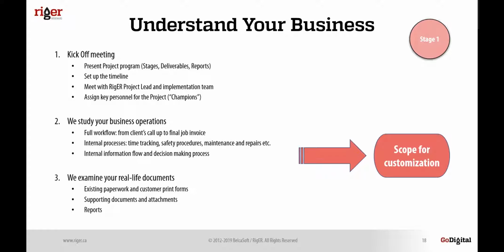On the first stage, understand your business, we usually start with a kickoff meeting. At the kickoff meeting, we set up the general timelines of the project and specify in which week we will do what. We will present the project program specifically for your implementation with all the deliverables and reports, and we will also present our implementation team.